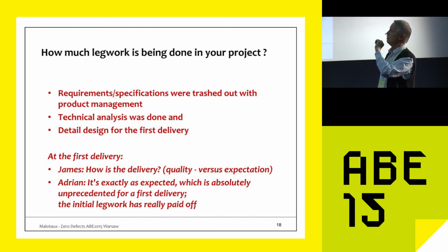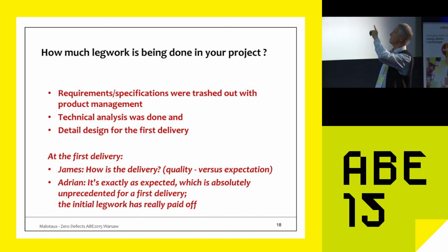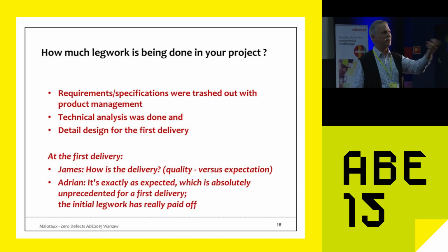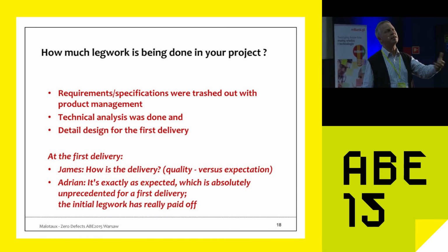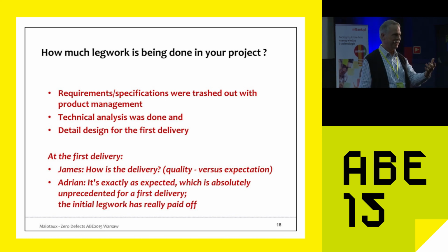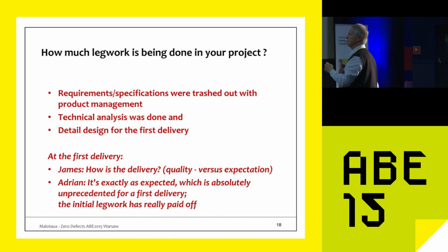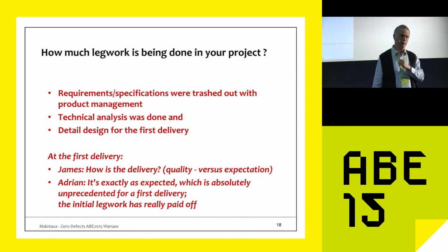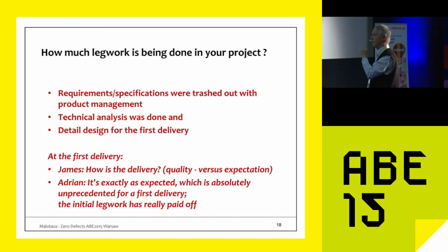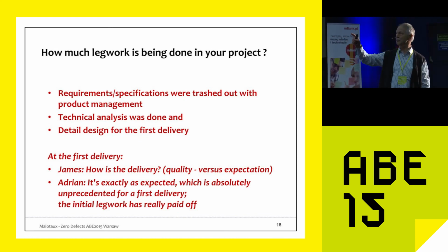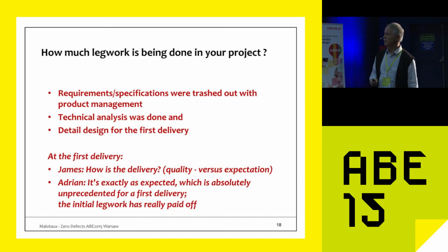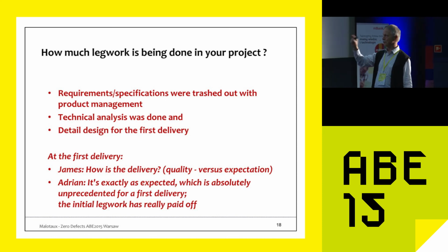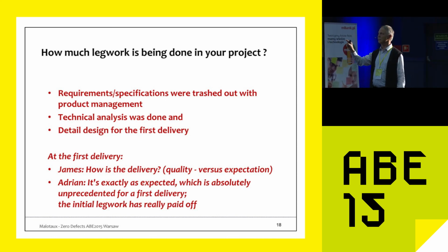One team said the requirement specifications were thrashed out with the product management. So product management tells this team what to do, and they went back to the product management and said, what is it really that you mean? And they spent time on that. Then they did technical analysis, and they did the detailed design for the first delivery. Design, remember? James told me what happened after the first delivery. He asked, and Adrian said it's exactly as expected, which is absolutely unprecedented for a first delivery. The initial legwork had really paid off.